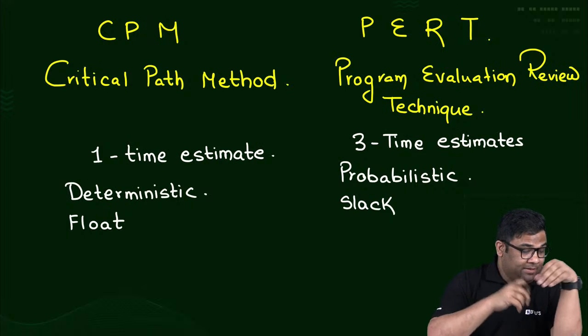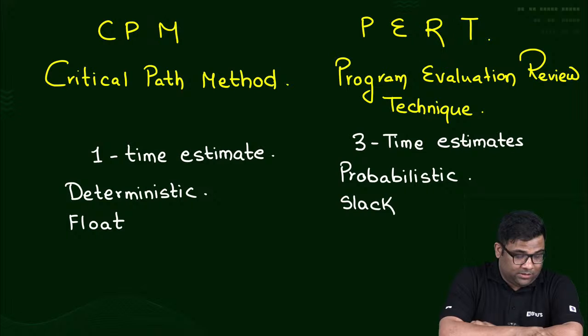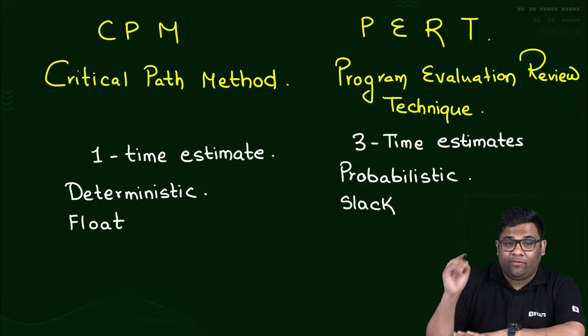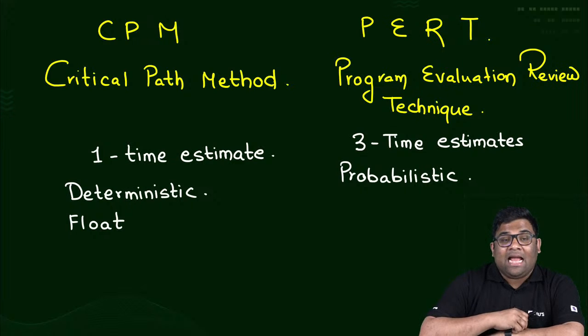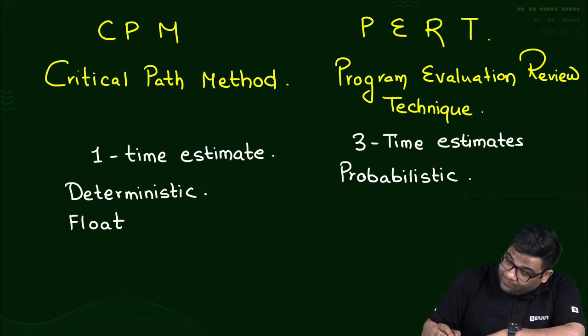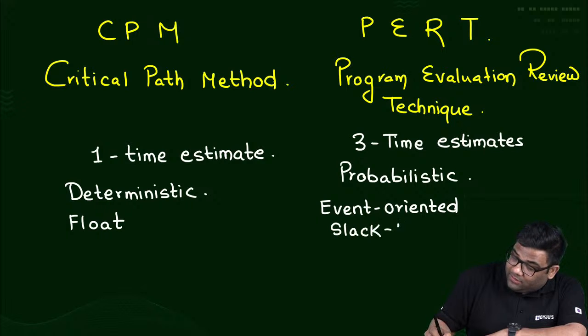Now, slack belongs to whom? Activity or an event? Slack belongs to event. Always remember, slack belongs to event. So this is event oriented, slack based, because the slack belongs to the event.